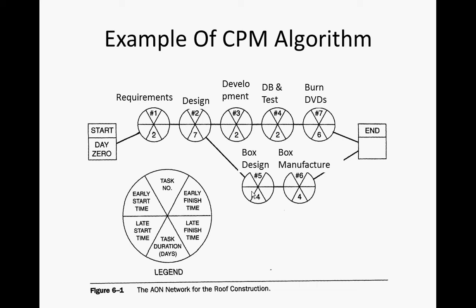That's important. Ladies and gentlemen, what here is the critical path? What's the path you have to keep your eye on? Okay, it's this one here, the lower one. So if we were to draw the critical path, it would be this guy here, going up through those nodes. That's the one that really matters as far as constraining how quickly we get things done.